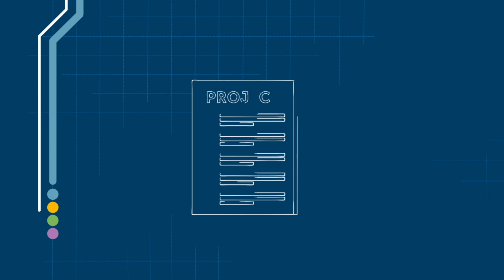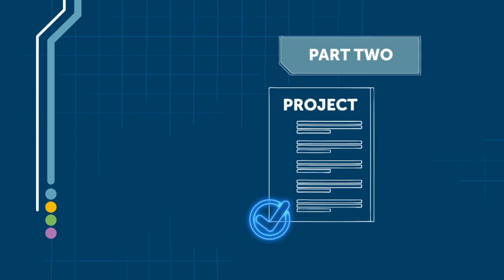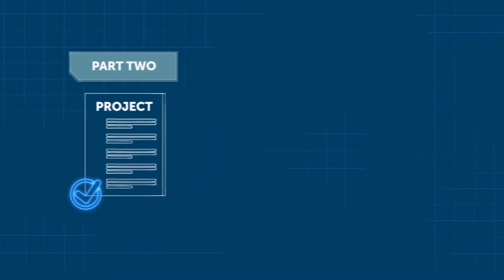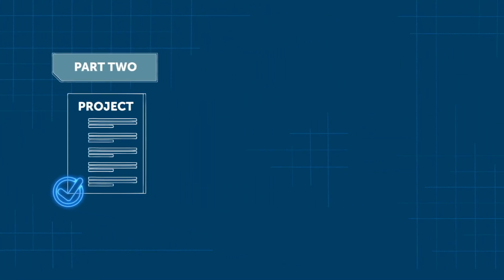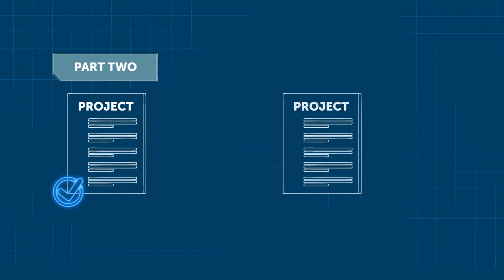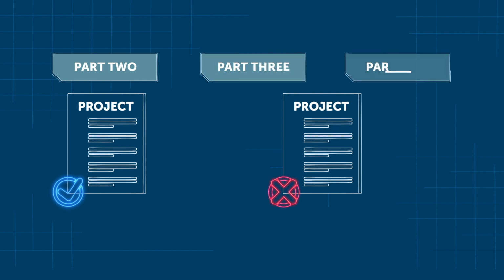If there is enough headroom capacity at the grid supply point and no transmission works are required, National Grid ESO will approve the project and we will enter your details into Part 2 of the Appendix G document. If there is not enough headroom capacity available at the grid supply point and transmission works are required, your connection will be placed in either Part 3 or Part 4 of the Appendix G document.